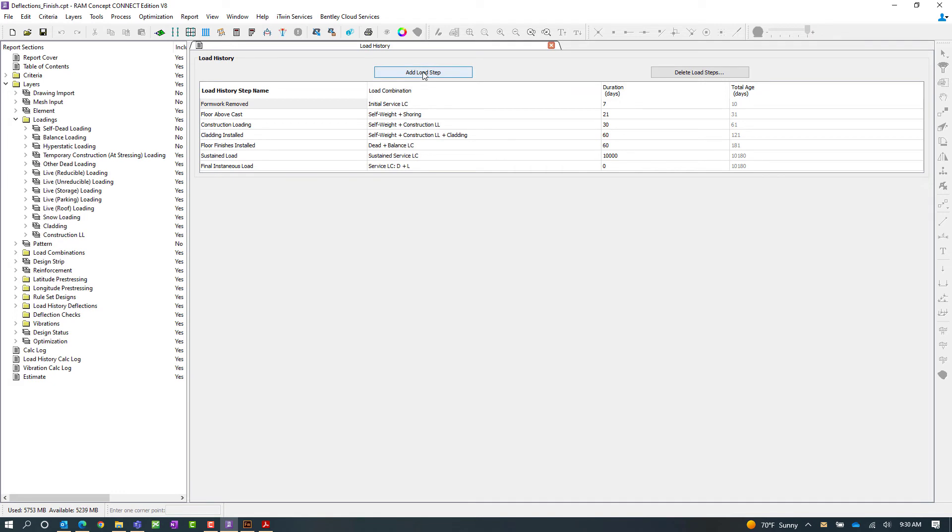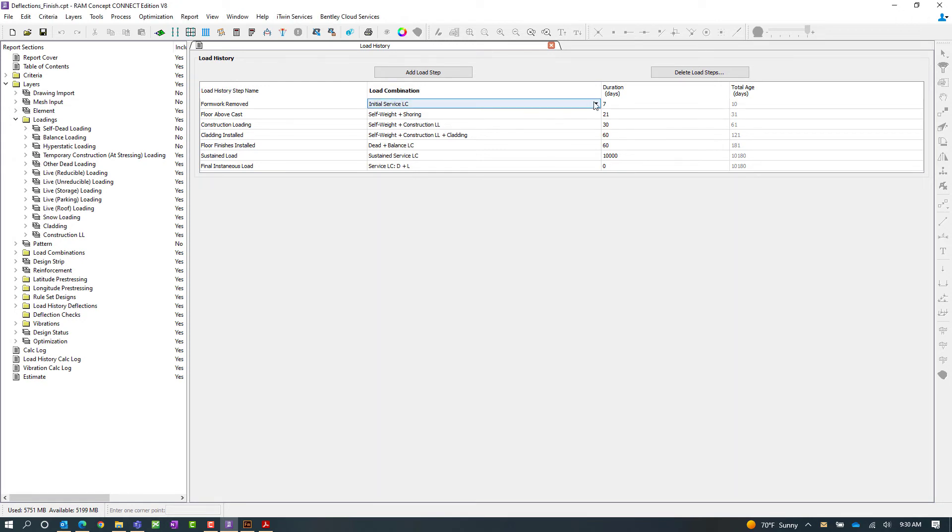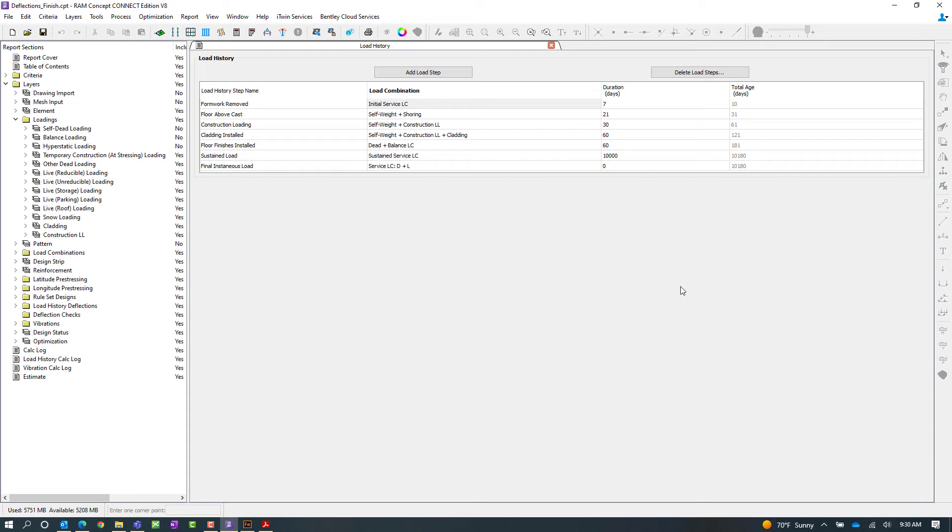To add a load history step you're going to go ahead and click on the add load step option, you can enter the load history step information and then reference a load combination. You're also going to enter the duration in days which will then allow the program to calculate the total age of the slab.